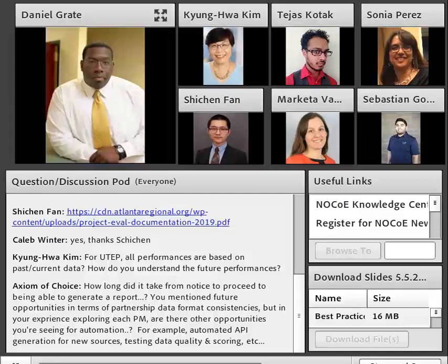Hey, this is Tejas. I can address some of this. So from getting in our project to having the final scores, that's a multi-month process. It took, I think, about 3 months in 2017 when we did it. It took 4 to 5 this past time. So it's a multi-month process to evaluate everything, to get all the data in and have some back and forth between us and our project sponsors to make sure that we have all the information we need from them.